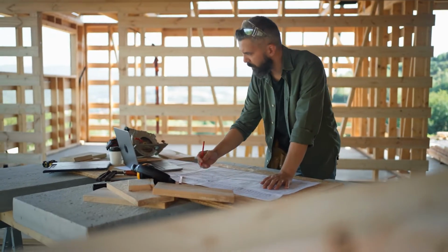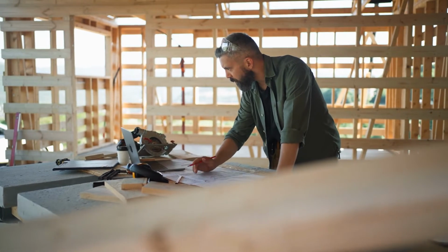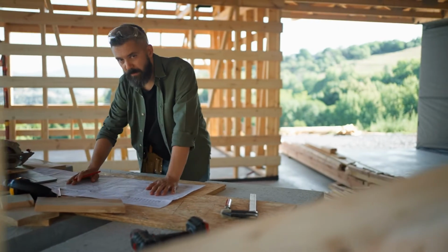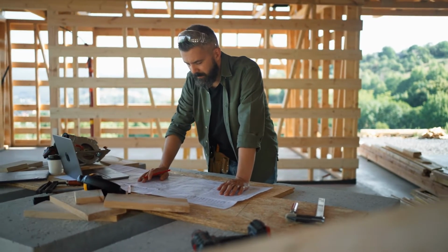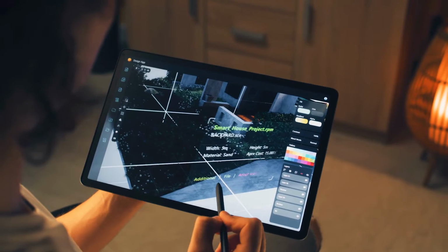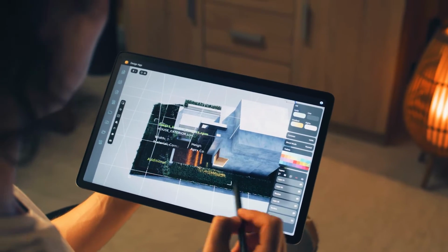Templates are key to making sure that things are accurate. Because you have this big built-out template, you're not going to forget things, right? If you're always doing estimates from scratch, or using old projects as your template to estimate new projects, they have old pricing, it's a different project, and it could have things in there that you forget about. Whereas with a template, you can have everything in there so that nothing gets forgotten. Even if you don't need it, you just take it out, like I mentioned before.